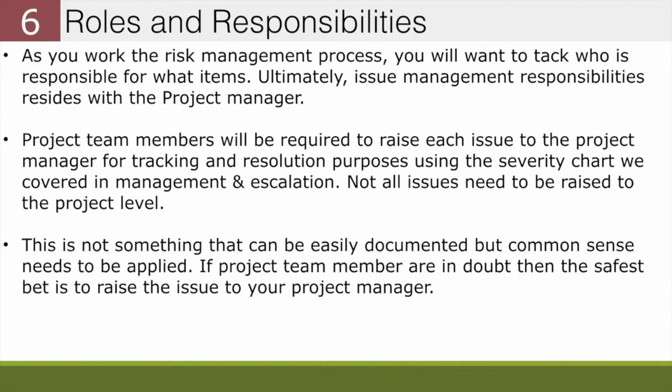Okay, let's look at step 6, roles and responsibilities, right? So ultimately, the issue management process will fall to the project managers, but they're not going to be able to do everything. And so what you're going to want to define is who's responsible for all these various issues that are occurring on the project. So team members will be required to raise issues to the project manager for tracking resolution using that severity chart. But not all issues need to be raised to the project level, right? Either to the project manager and or to the executive.